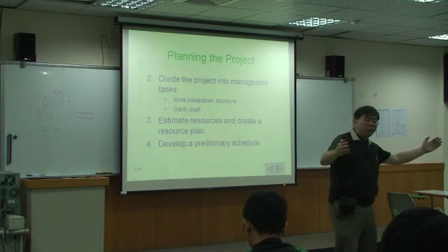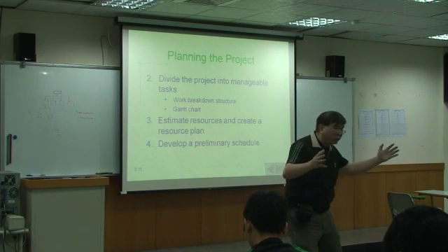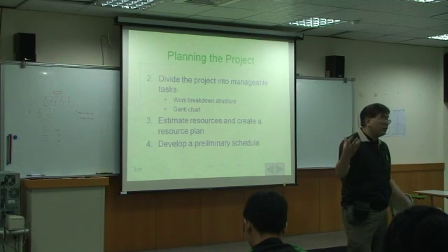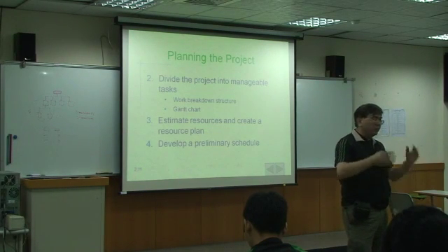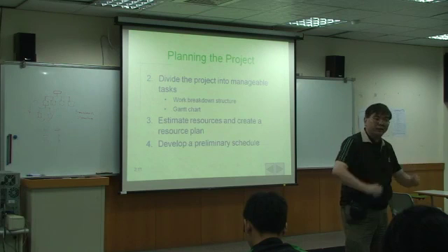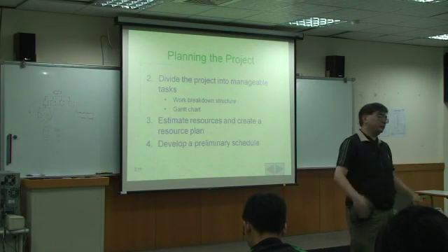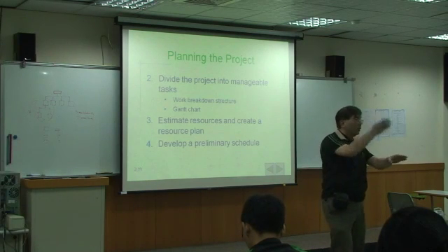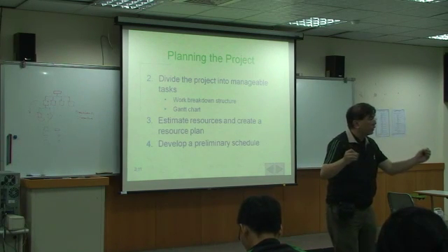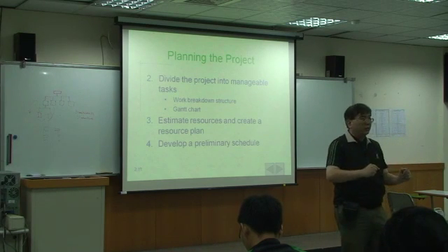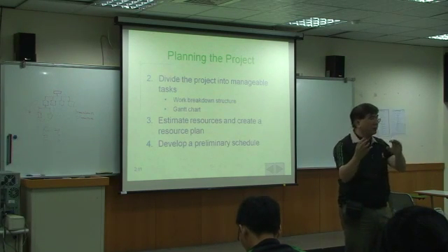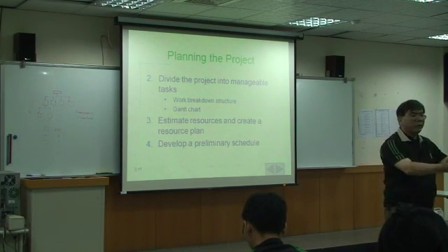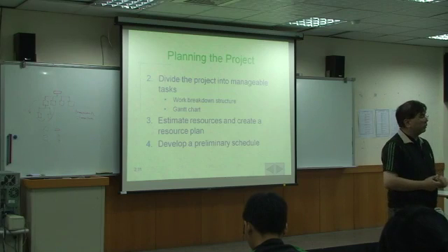If the money only comes in when you close the project, the time spent is 1 year and your company will break up. So it's terrible. So you must cut in some checkpoints. If the check is okay, some of the project's money will go into your account, and you can pay your members.